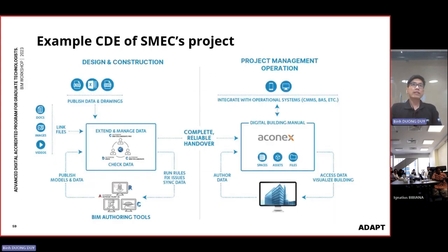So let's say this is one CDE that SMEC is doing right now for the airport project we are working on. For design and construction, we are using the Autodesk Construction Cloud, ACC, to help with storing, creating, and exchanging the data. From the client side, the project management or client representative is using Econex.